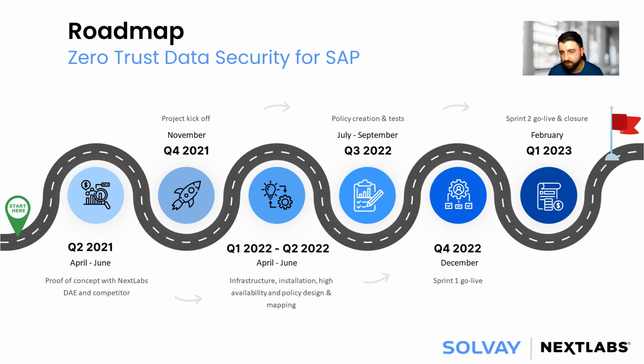And then after that, we had all the scenarios fully implemented, which involved more than 100 tables. So it was really a big scope. We impacted hundreds and hundreds of transactions, tables, programs. So it was definitely a huge implementation, and in my opinion, in a very short time frame, especially considering that 6 months of the project was mainly to set up the infrastructure.